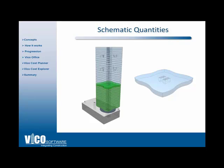When you first receive drawings for a project you need to bid on, you would either receive detailed drawings for a hard bid project where the design is already complete, or you might receive just a massing sketch and need to quickly create a building model that represents the design. You don't typically have time to create a very detailed model at that point — you can create something very simple, representing spaces such as retail, residential, circulation, or parking. Here on this image you can see parking represented with gray blocks, office space on lower floors, and residential space on top in a different color. These simple objects can be created quickly and give you enough detail to get started with an estimate or budget on a hard bid job.